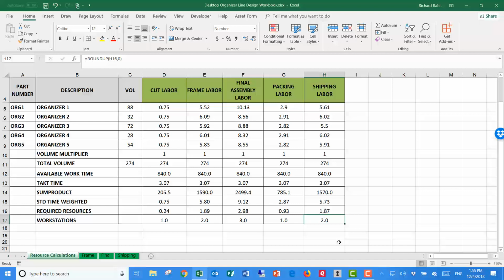So that's it. Let me just comment, too, that these are all, in this example, all labor, but if we have multiple resources, like machine and labor, or different labor categories with different times, not a problem. You just have to calculate all of those individually. So you'd have to add columns to your worksheet. But that's basically how we go about it.